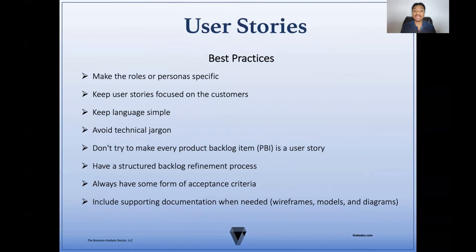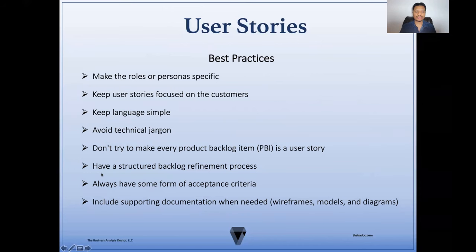Now let's talk about some user story best practices. You always want to make the roles or personas specific. Be sure to keep your user stories focused on the customer. Keep the language simple and avoid technical jargon. When dealing with the overall product backlog, don't try to make every product backlog item a user story — there are going to be other backlog items such as tasks, spikes, or epics. Another best practice is to always have a structured refinement process, typically done in preparation for your iteration planning sessions. And always have some form of acceptance criteria. The last best practice is to include supporting documentation when needed, such as wireframes, models, or diagrams.